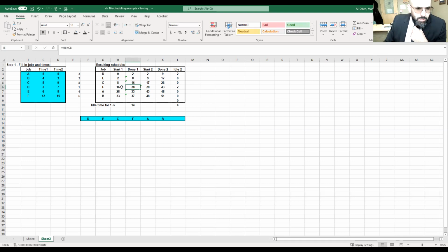And then we will start with F on day 16, and that will take us 12 days to finish. So 12 plus 16, that's 28. And then moving into this one here, 28 to 33, that will take us 5 days to finish A, and 33 is the starting date for B. And that will take us another 4 days to finish it. So that would be 37. So we're done with work center 1.